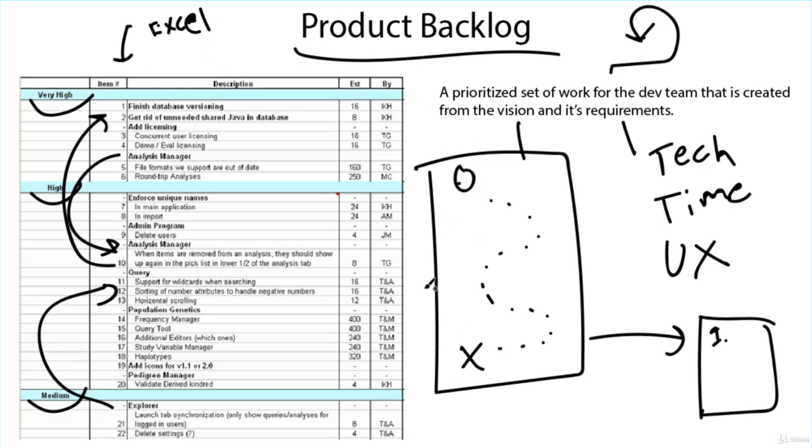This is a changing document. It's going to change basically every sprint and even throughout sprints, because once a sprint starts, a sprint is going to take all of this and put it into the sprint backlog, which is essentially just a smaller version of this that you're going to work on for the sprint. But once this is all done, you just move on. The sprint starts, and then the product owner can do all the manipulation that he needs to for the next part, and then you grab it all and you get ready for the next sprint. You have a good prioritized list. The product owner will then share it with the dev team. The dev team will talk about it. They'll create their new sprint backlog, and it keeps changing and so forth and so on until everything is complete.